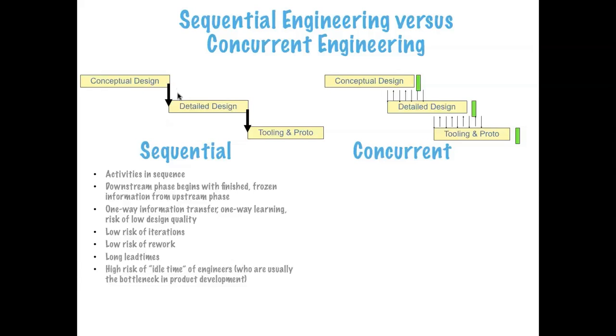There is a high risk of idle time for the engineers, because while the detail engineers are ready to start designing, the concept design is not yet finished, so there will be redundancy of time. The easy thing about it is that if this is really a closed, standalone, modular task, you don't need a lot of feedback upstream or downstream. Everybody knows what they have to do.